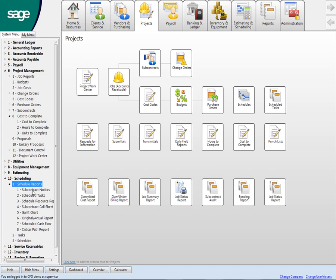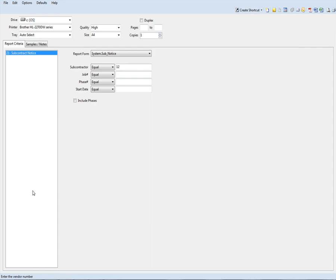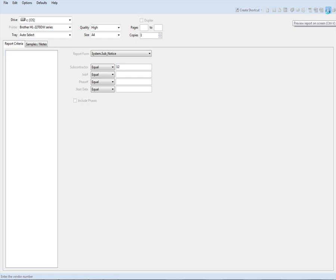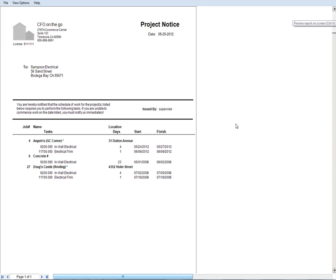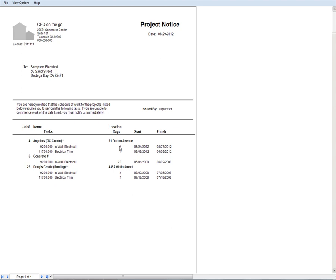But I want to close that because here's where it really pays to use it. And it's just one report right here. I'm not sure how you do this in your company today, but imagine somebody's making a whole lot of phone calls or radio calls. So I am going to do for one subcontractor, subcontract number 12, which is my electrical guy. So what I got from updating all my schedules on the projects that are going on is Samson Electrical is going to get this project notice, either emailed to him or faxed to him. And it's going to tell him that he needs to be on these three jobs doing these tasks of work for these many days of what his schedule is for, and I want him on starting on this date and finishing on this date.